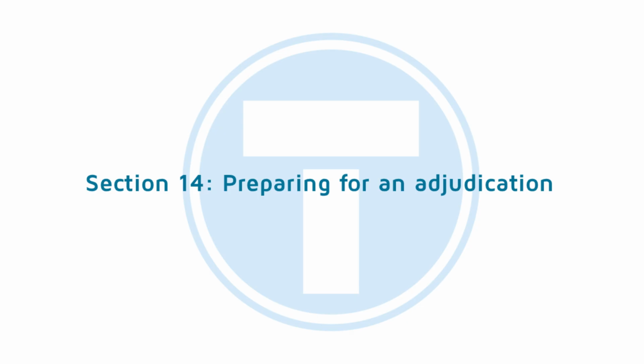Section 14. Preparing for an adjudication. In preparation for adjudication, whether launching or defending, it is important to keep good project records. Max Abrahamson was an Irishman who in 1965 wrote, "A party to a dispute, particularly if there is arbitration, will learn 3 lessons, often too late: the importance of records, the importance of records, and the importance of records."